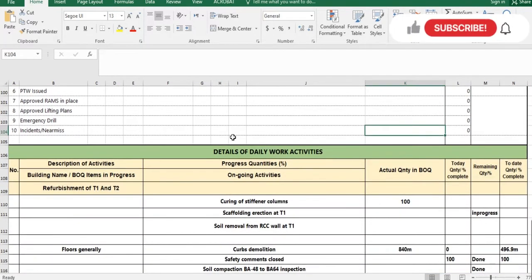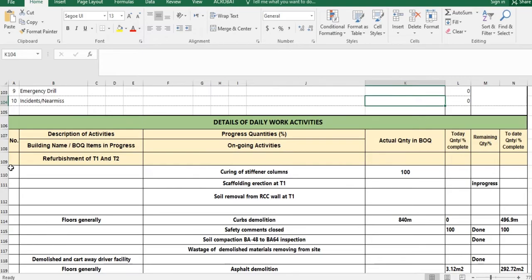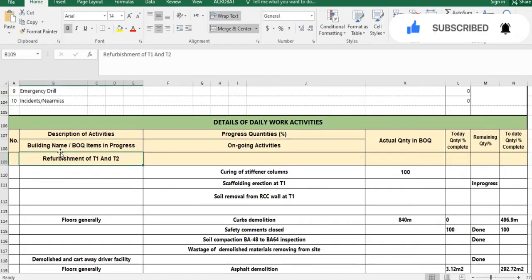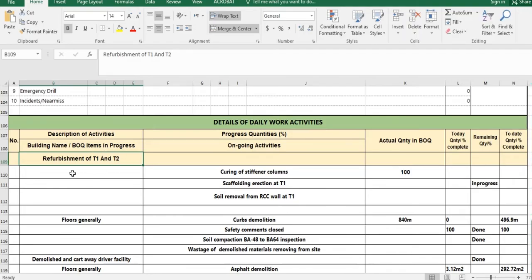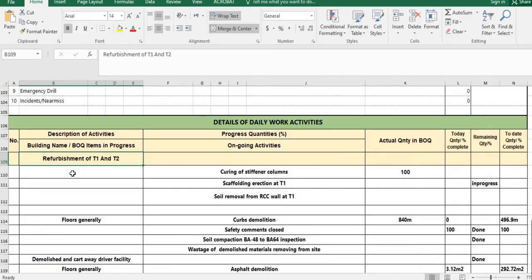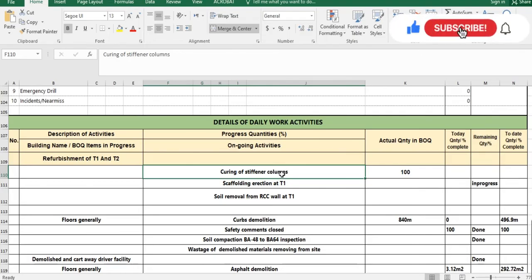The important section is filled by the site engineer who prepares the daily progress report. Here you put the serial number, building name, BOQ item progress. You write the BOQ reference numbers for each activity. You have to be specific about which activity is going on at site and write the corresponding BOQ reference number and BOQ name for that activity.